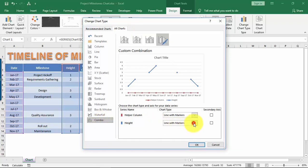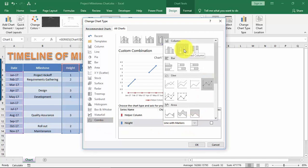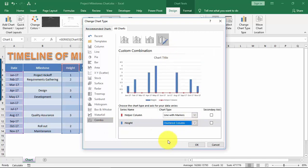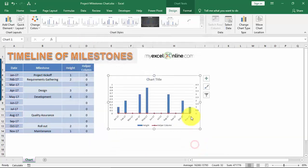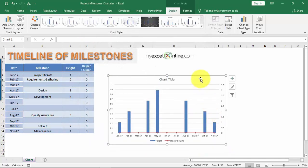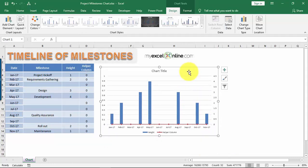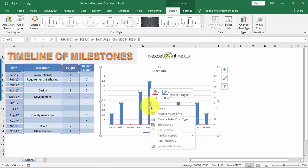From the Height dropdown, select Clustered Column. Then check the Secondary Axis box for the Height series. For the Helper column, make sure Line with Markers is selected and the Secondary Axis box is unchecked. Click OK. Let's make the chart a bit bigger so you can see it clearly. We did this so our heights show up as columns in the timeline.